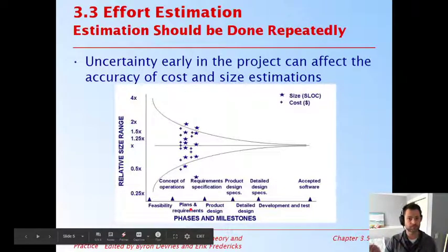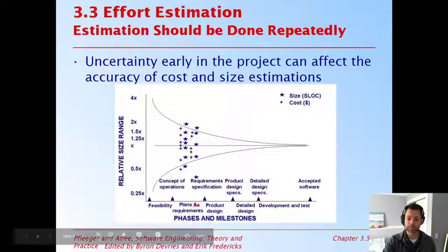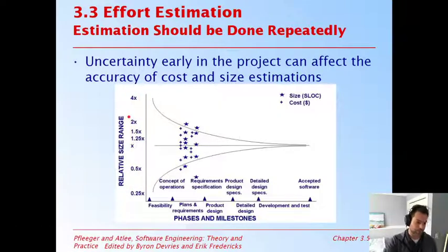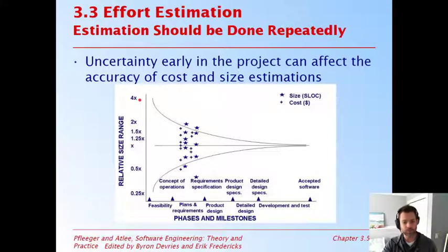So which stage are you at? And again, process dependent, obviously. This could be a loop or a waterfall. And on the y-axis here, this is going to be the amount of uncertainty in your estimation. So it's not really spelled out well in the chart here. So 4x would be that you basically have 4 times the amount of variability in your estimation.